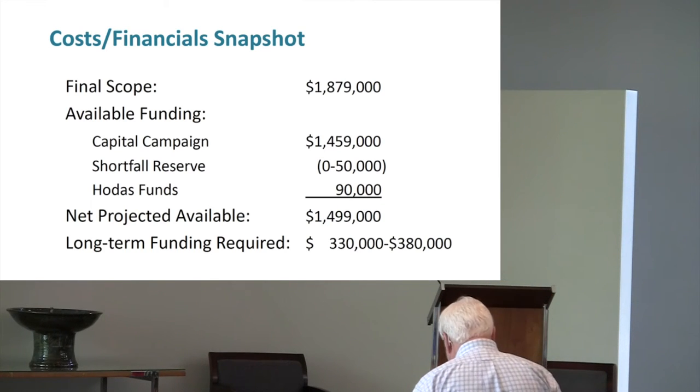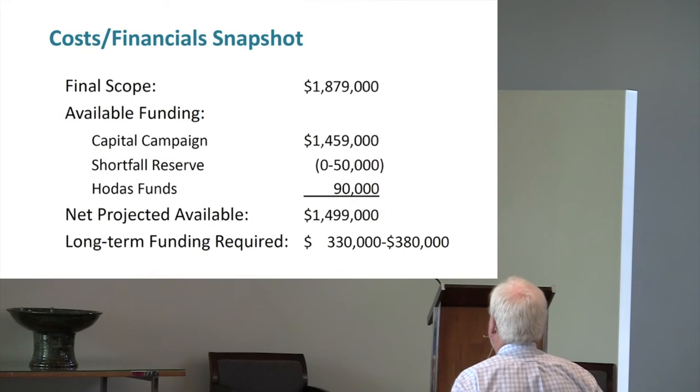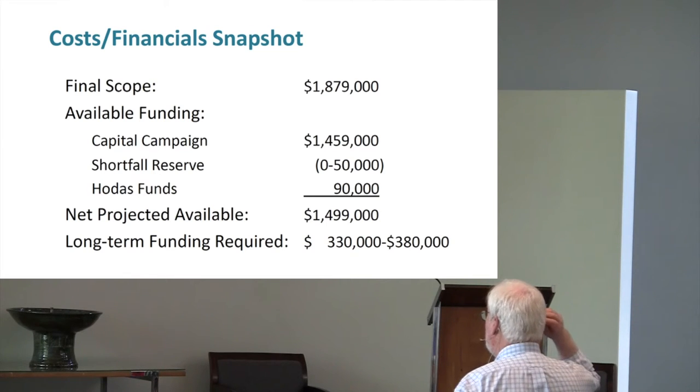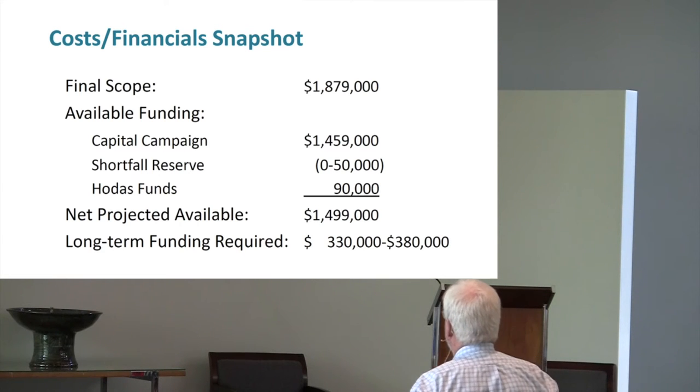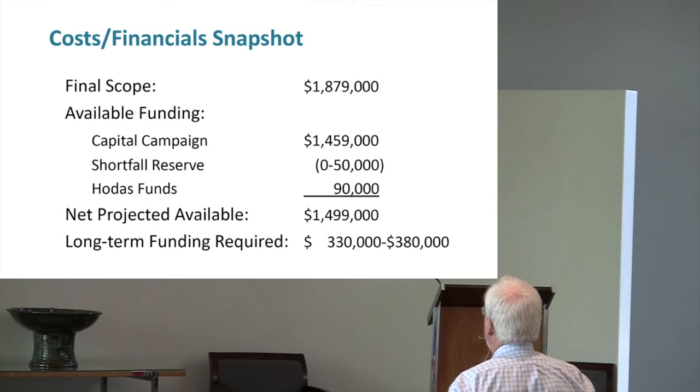They gave a bequest of $40,000 to the church for some landscaping and $50,000 for a geothermal or ground source heating pump and dump system. That system is no longer legal, it no longer meets code, and a true closed loop ground source heating system would be about $125,000, so we really don't have the funds. Ed Sharples and Kathy talked with Bunny Hodes about it, and the family has a particular interest in accessibility and was happy to see those funds go to the project in general for accessibility.